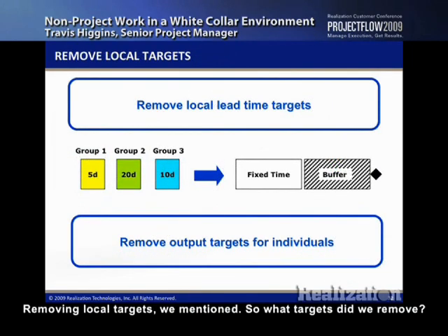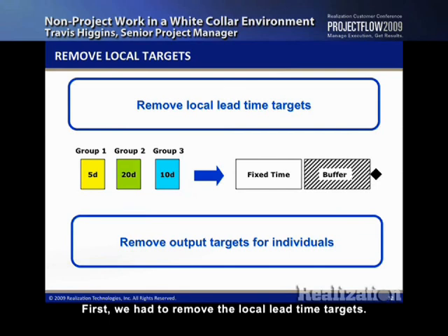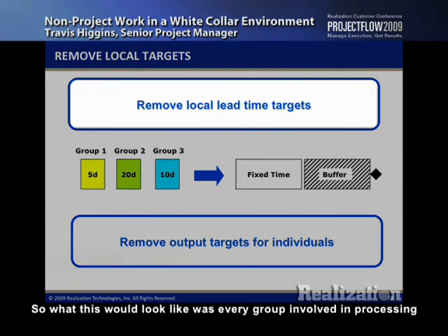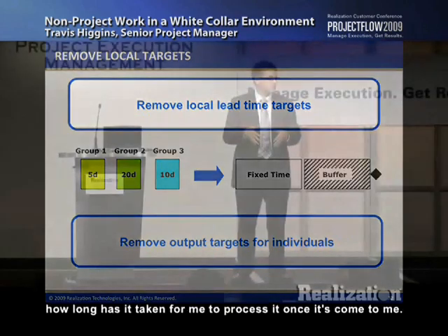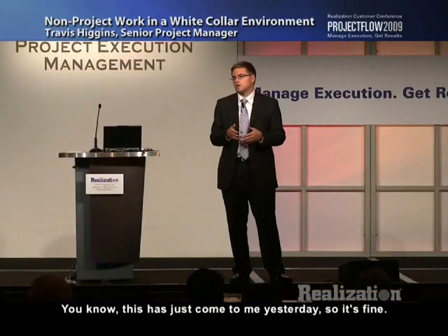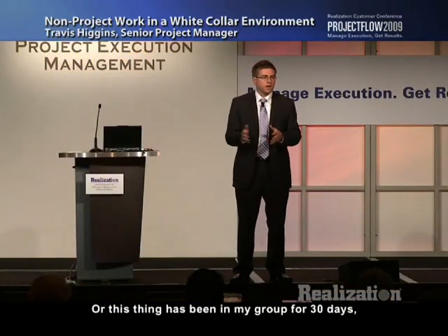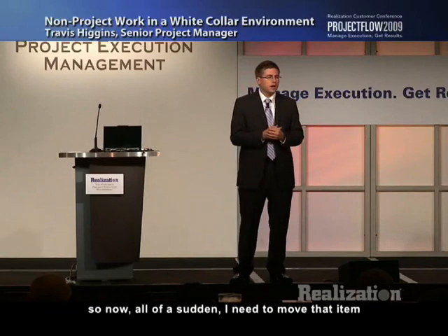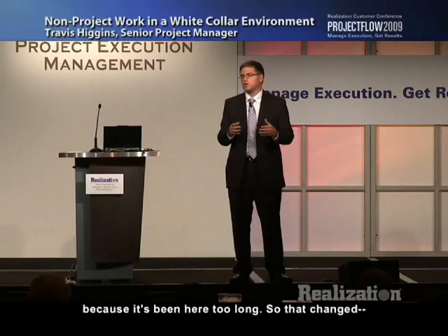Removing local targets we mentioned. So what targets did we remove? First, we had to remove the local lead time targets. So what this would look like was every group that's involved in processing a purchase request would think about their performance in terms of how long has it taken for me to process it once it's come to me. This has just come to me yesterday, so it's fine. Or this thing has been in my group for 30 days. So now all of a sudden, I need to move that item because it's been here too long.